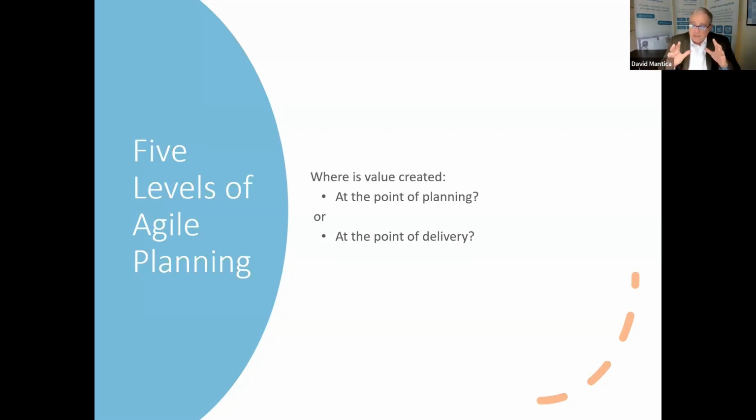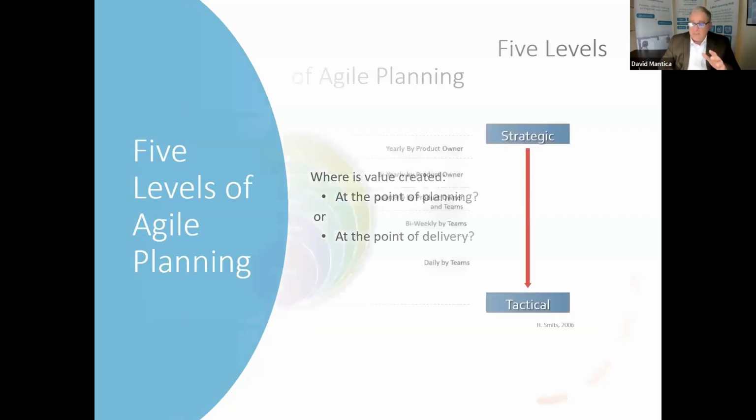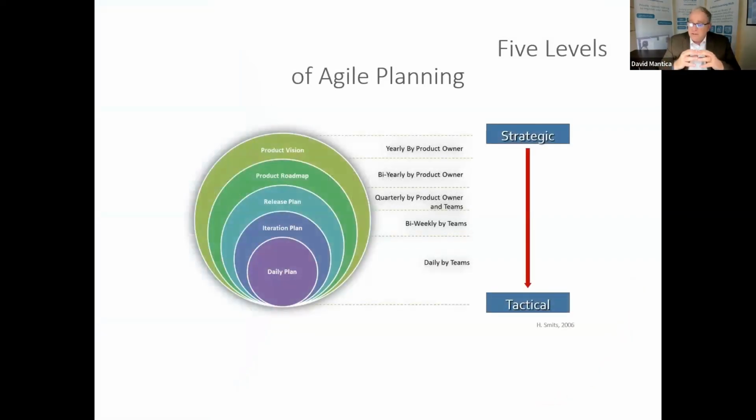But there's 5 levels of planning. You've got the vision, the roadmap, the release, the iteration, and the daily. The daily and the iteration can be written in pen. The iteration is your time box. That's your time box production of the work that you're going to work on during that time box. Everything else, release plan, roadmap, and vision, are going to be written in pencil.